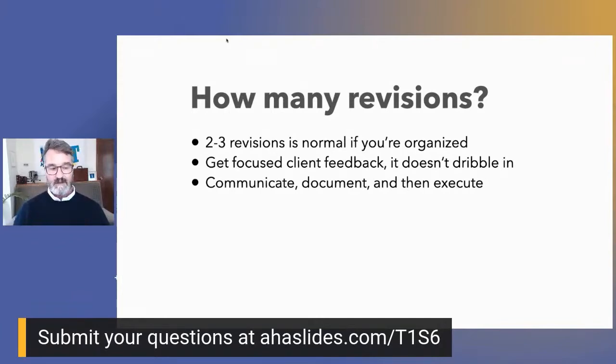But what you want to do is help them to really focus in stages. So what I like to do is break it down into more or less three stages. In the conceptual stage, that's the rough sketch stage, we can be talking about philosophical things like the voice or the overall tone or the look and feel of the piece, right? It can be about the photography, it can be about the color schemes, or even the fundamental thrust of the message. But this is the time that they can change their mind about the big stuff.